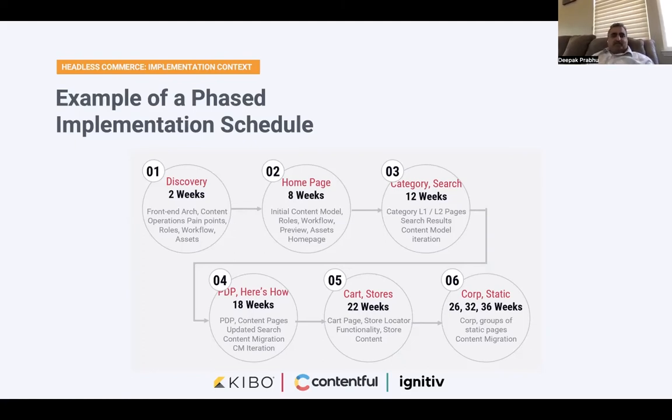So please remember the front-end architecture needs to account for a lot of other front-end integrations that have to be created anew as outlined in the solution architecture, which is precisely why the initial release for the homepage is 8 weeks long, since you have to consider the Google Analytics integrations or any personalization integrations that you may have with your previous site. Your architecture will have to work in a model that allows for the existence of the current site, even as you make changes to certain sections of it.